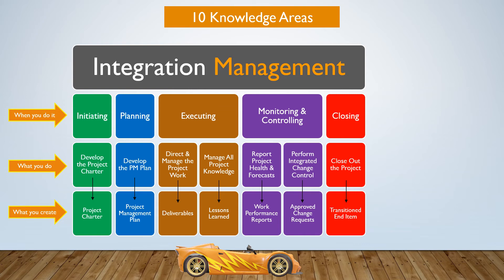Once all the project work is done, we can close out the project — that means all the deliverables have been created. Closing out the project means we're going to have an end item. For example, if you build a house, the end item is the completed house, and we need to transition that end item over to our customer so that they can use it. Because we're done with the project, we now need to give that to the customer for their benefit.